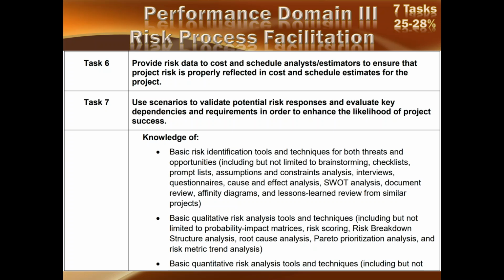Actually, this is very interesting that whatever you are planning in risk, the actions you are going to take, will take some time and they will take some money. So this must be represented in your cost and schedule plans. So the risk data must be provided to the cost and schedule analysts or the estimators to ensure that project risk is properly reflected in your cost and schedule estimates for the project. So this must be properly integrated.